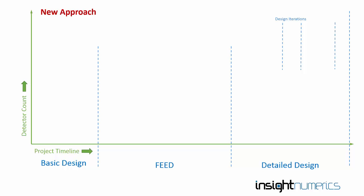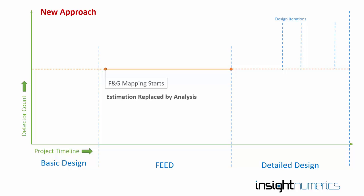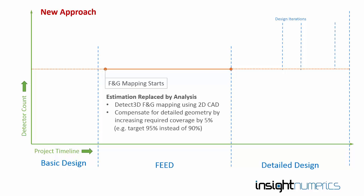Instead of performing the fire and gas mapping at detailed design, more and more of our customers are now using Detect 3D much earlier to arrive at the initial estimate of Detector Count. The reason for this is that you can greatly increase the accuracy of the initial estimation by loading in the 2D CAD into Detect 3D and performing some fire and gas mapping as soon as the 2D CAD is available. To account for objects that may not yet be in the CAD file, such as pipe work, we recommend increasing the coverage target from, say, 90% 1-out-of-N to 95% 1-out-of-N, in anticipation of the obstructions created by the additional geometry. Even a very coarse fire and gas mapping study will result in a much more accurate initial estimate than any other technique.